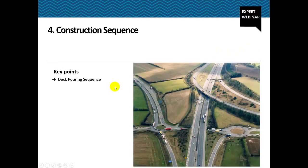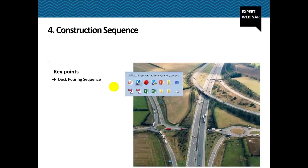Now we'll talk about the construction sequence of this bridge. The main part of the construction sequence was to decide the pouring sequence, how the deck was to be poured. Because the bridge is so skewed, especially on the eastern side, it was critical to have a very good pouring sequence so that we don't have any uplift in any of the bearings, or excessive deformations in the steel girders. So let us look at how the pouring was done in this particular